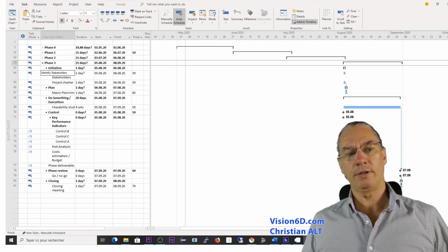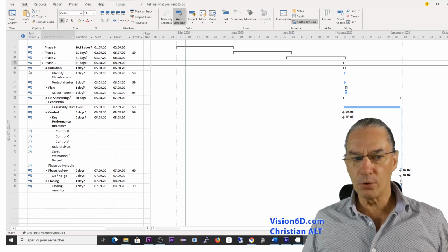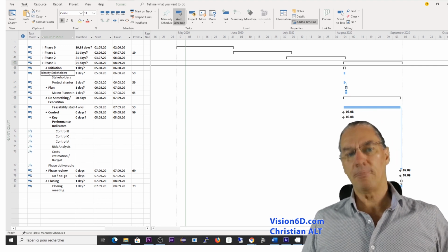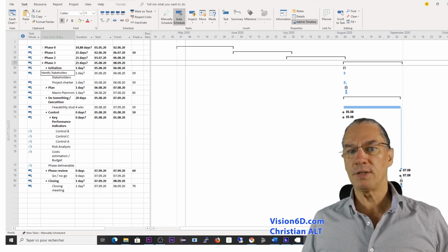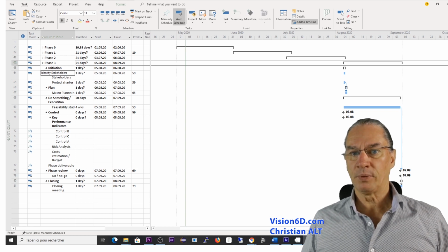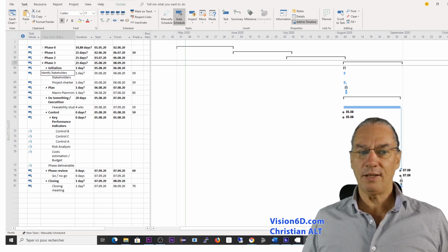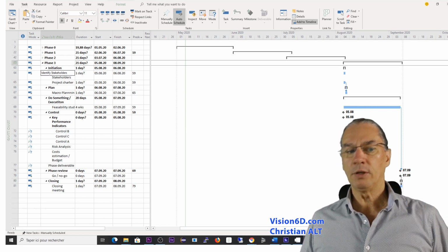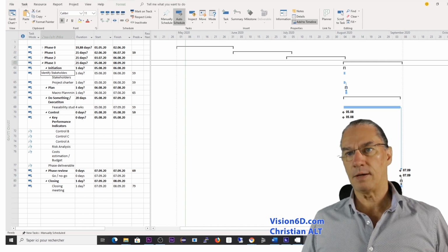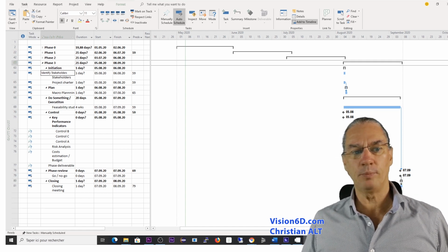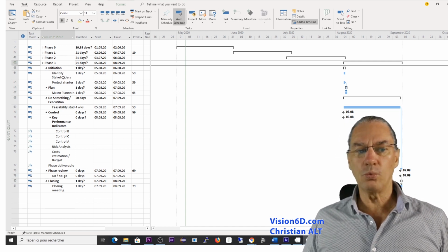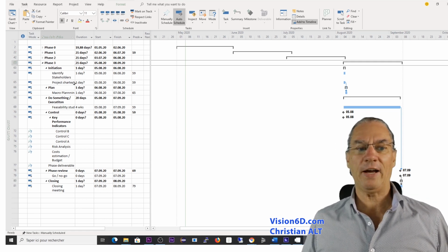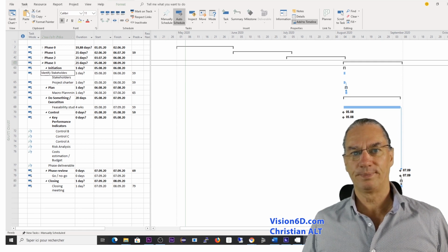Whereas when we were in the construction phase, those stakeholders were still present, but not as much as the companies that were building, the builders. So you see that depending on phases, you can have the same stakeholders, you can have new ones, some that go away simply. So that's the reason why you have a new step of identifying the stakeholder.